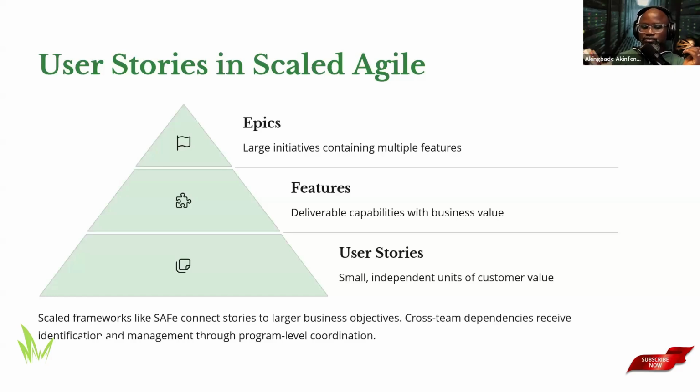Now the features would be, specifically, allowing tourists, investors, students to get real-time information on historic sites, location history, news, current affairs of that location, whatever it is. The user stories get even smaller, right? We're talking about the components for each of those features. We are breaking it down into smaller chunks so that the development team can build something that can be easily implemented at the end of the day.